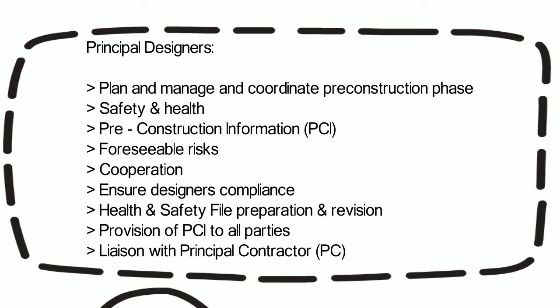The principal designer is responsible for the production of the pre-construction information, known as the PCI. They must provide assistance to the client in the PCI preparation. The PCI does not have to be a physical document, but it may be a set of information, plans, drawings, documents that together make up the pre-construction information. The principal designer must look at foreseeable risks, identify them and eliminate or control the foreseeable risks to any person involved in the construction of the project.